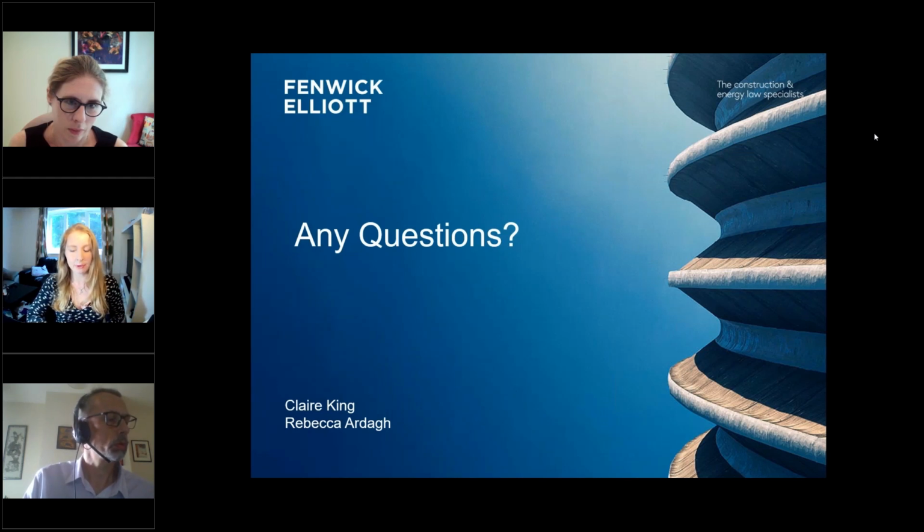Unfortunately not. So it will be taken, as discussed earlier, from a combination of the wording and the contract as a whole. So the wording itself does not have to expressly state that it is a condition precedent, but like we've pointed out and Claire said recently, in order to be enforced as a condition precedent, it's likely that at least the English courts would require the wording that is used to be extremely clear that that is the intention. Even if it's not expressly stated, we need that conditional link.